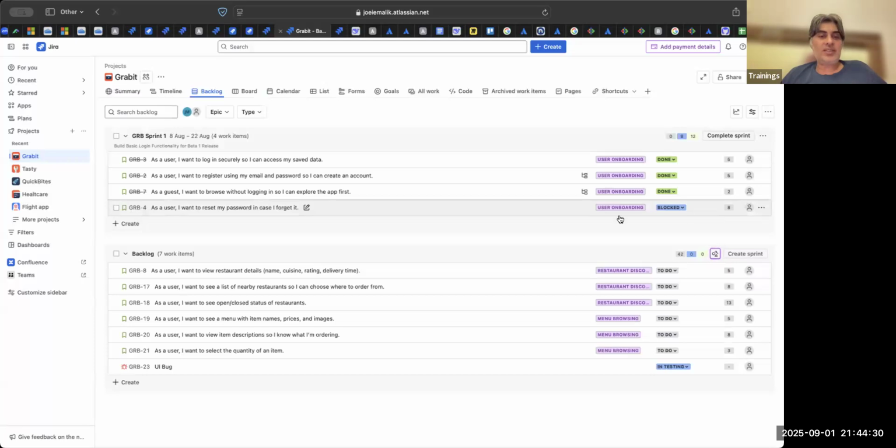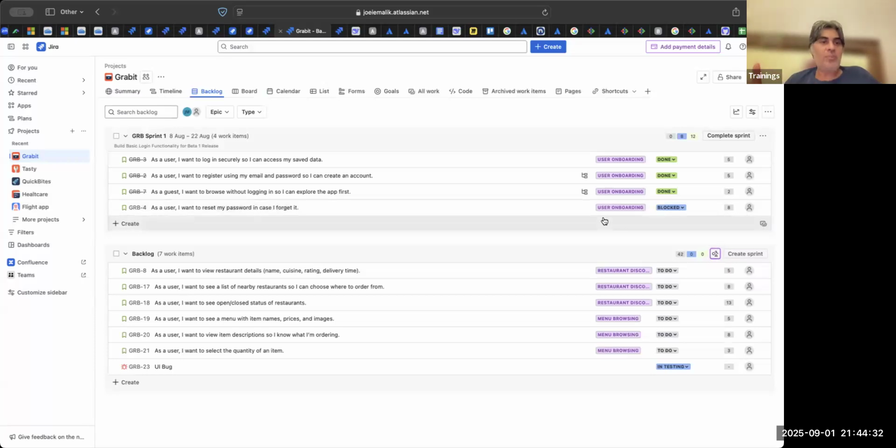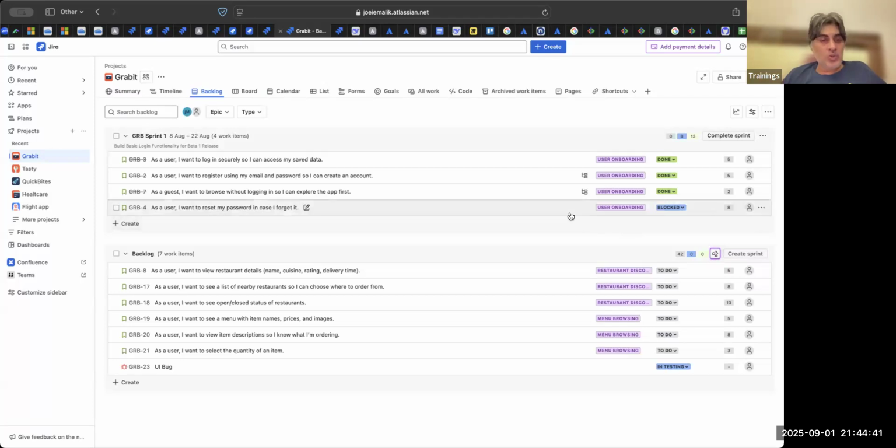Maybe the API task is not over. Because the API task is not over, rest of the task is not over, but we can still, let us say, claim 2 points from it. So some teams will create a new story and mark it as a 5-pointer and close this story with a 2-pointer, but it is not a good practice.